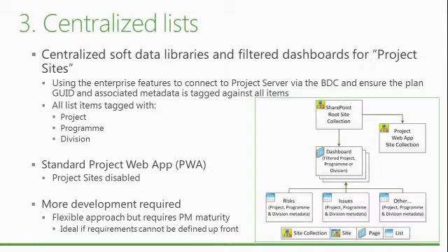And we can start to use some of the enterprise features that you get with SharePoint 2010 as standard, because, of course, Microsoft ensure that you have the enterprise version before you even start with Project Server, right? So you now have BCS with you, and you can attach that directly to your Project Server reporting database. And you can attach the codes and the project details, like the title of the project, against everything that you do. And of course, the project managers might put programs against their project plans, and you can bring that in as well with the BCS. And you can do the same with the division.